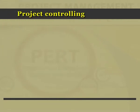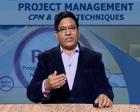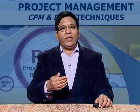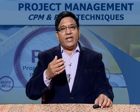The third aspect is project controlling, done while the project is underway. This involves monitoring resources, costs, quality, and budgets. The second activity is revising and changing plans as per contingencies. Third is shifting resources to meet demands — when one activity is ahead of schedule but others are lagging, resources may need to be reallocated from activity A to activity B to bring it back on track.